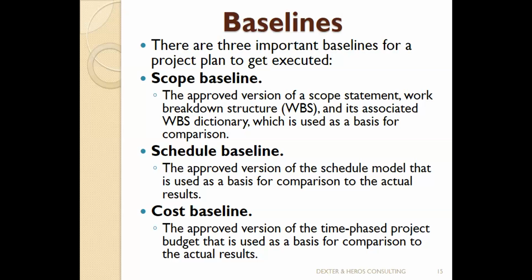So when the plan is baselined, it does not only mean that it is approved, it means you cannot add or remove from the plan without coming back to the sponsor. So let me just make the point. Two points. One, make sure before you start implementing your plan, it is approved by the sponsor. We call it baseline. Two, once the plan is approved by the sponsor, anytime you want to make a change to the plan, get approval from the sponsor first.